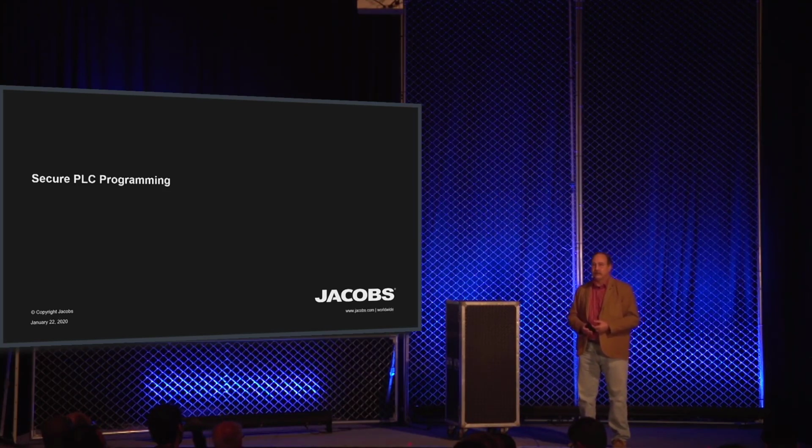That's a difficult thing to do. Contractually, the problem with control systems engineering is it occurs as one of the last elements of a large capital project. And it's unusual not to see things at that stage of the program that are over budget or late. So you're coming in, and it's a very high pressure environment, and we get what we call a drive-by integration,